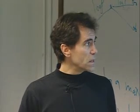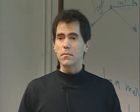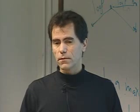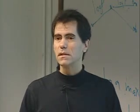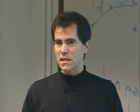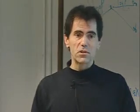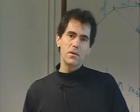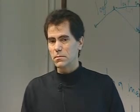Usually, these are set early on in the mission, in the program milestones, and for political and for programmatic reasons, you tend not to deviate. You try and meet those milestones, even if the project is not as mature as you'd like. Usually that's one that you try and keep hold of. So maybe you don't have 10%, maybe you have 5%, or maybe you don't have 90%, you have 70%.